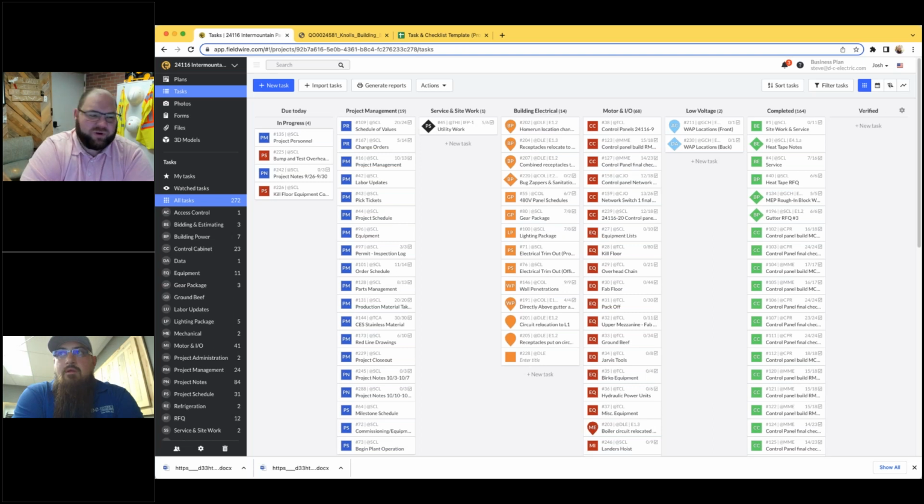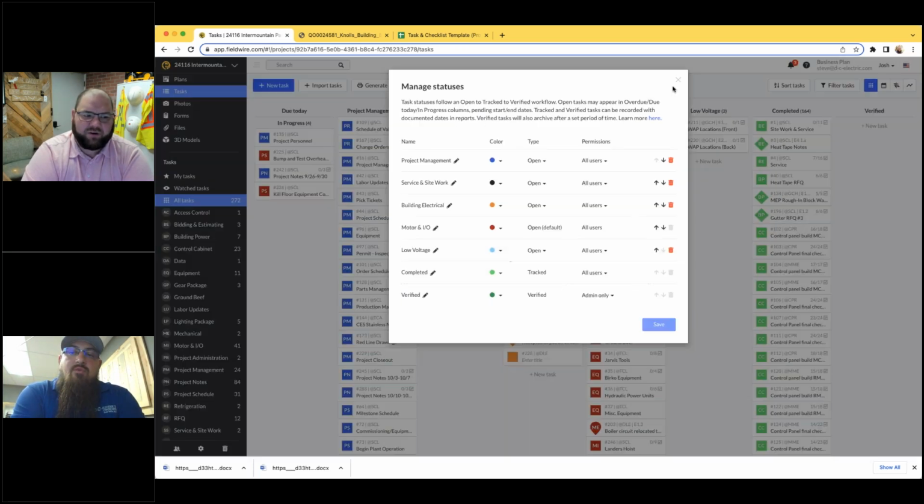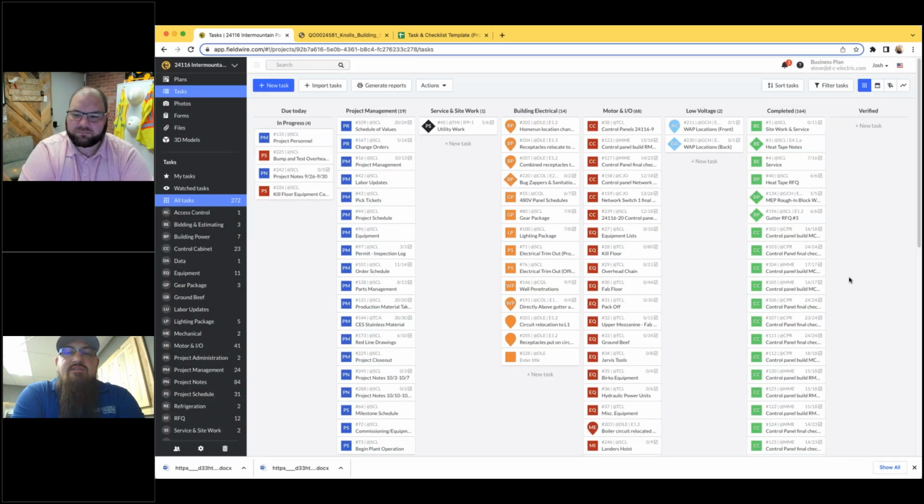So I was wondering if you could tell us a little bit about your statuses here. What was the process of creating those? Are they standard or unique? Statuses, when I'd send out reports, everything was priority 1, priority 2, priority 3. It kind of didn't make sense to some of the generals. So what we've done is we created a status for the different phases of the project. So you've got project management, service and site work, building electrical, motors and IO for industrial projects, and then low voltage, because we do all that in-house, so it's nice to have a separate column for that phase as well.